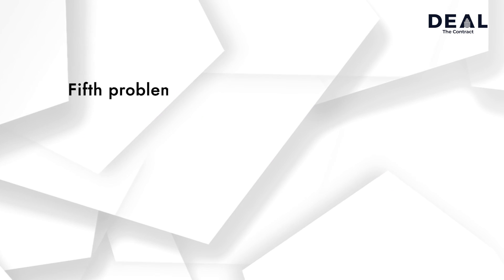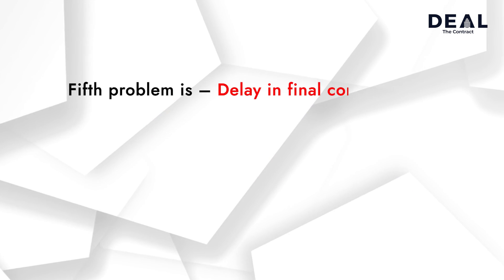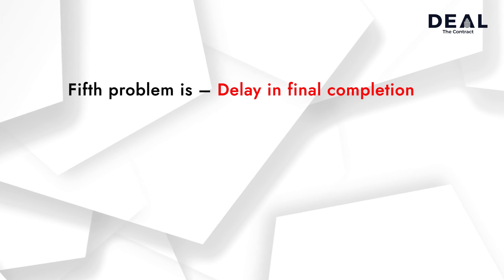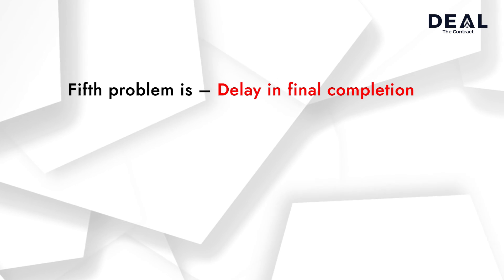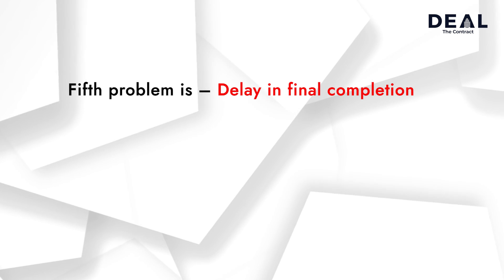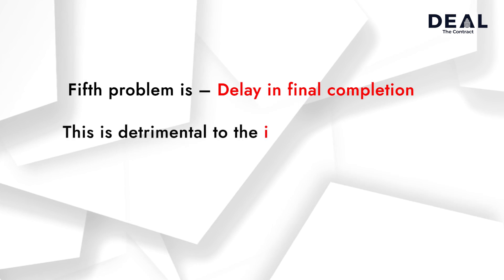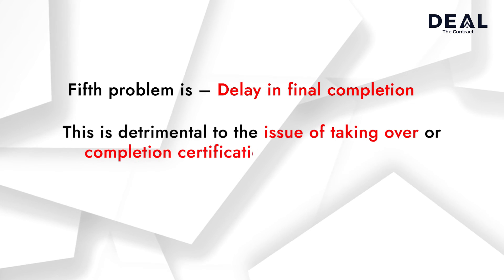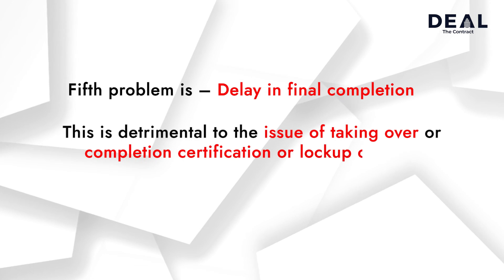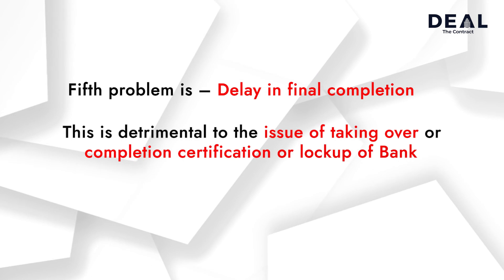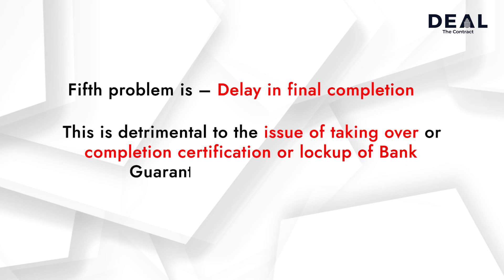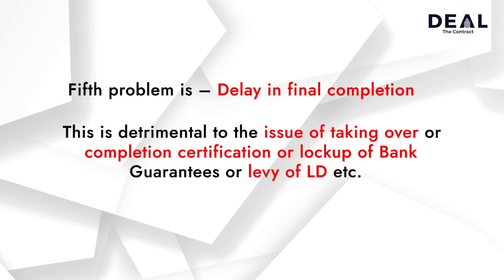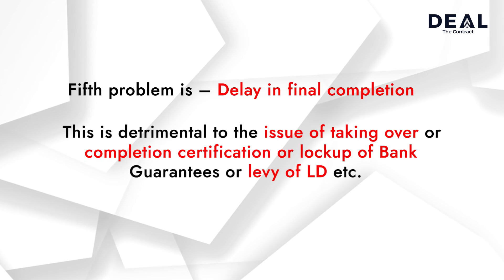The fifth problem is delay in final completion. This is detrimental to the issue of taking over or completion certification, or lockup of bank guarantee, or levy of liquidated damages (LD), etc.